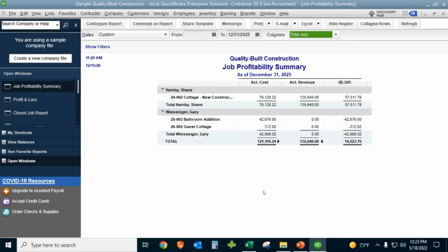So we'll see a lot of times the invoice is done on the 10th of the month or something, but it's for all the costs in the prior period. So, you know, here you're on June 30th, you're doing your invoice that you're sending to, like, the bank for a draw request. And you're doing that on July 10th. Well, you enter that invoice on July 10th and all of your costs were through June 30th.